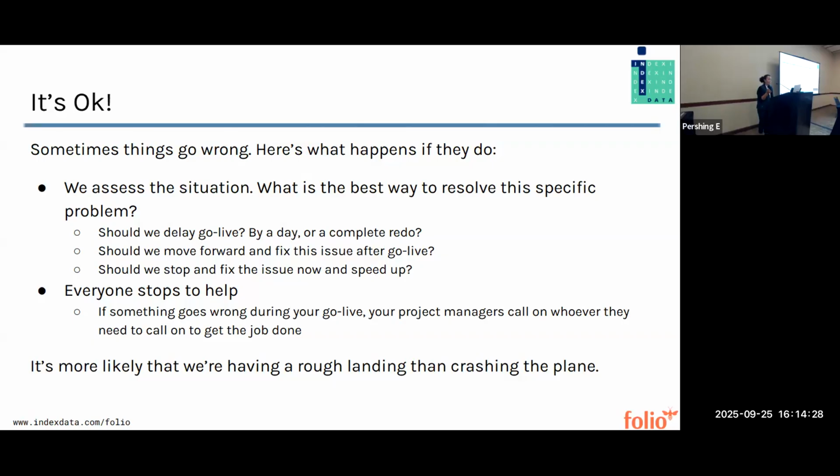The next thing is maybe we can fix it and move forward after you go live. Sometimes the data isn't as important as having you live on the system, so that's another option. And then another possibility is stopping and fixing the issue right now live, even though it's a little bit risky. Sometimes that's the best solution to the problem.